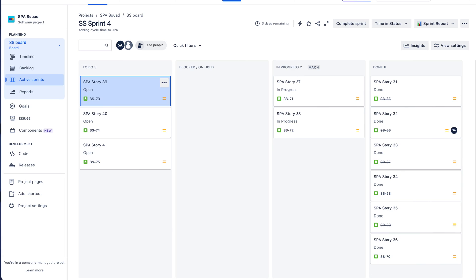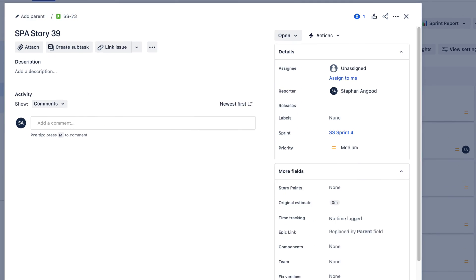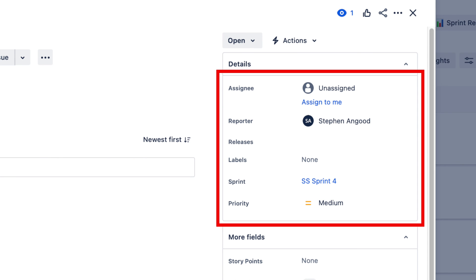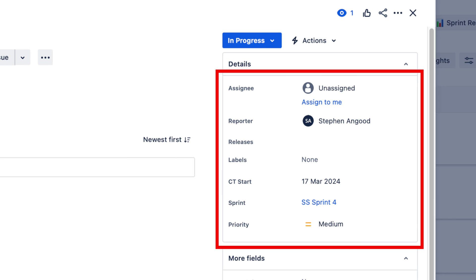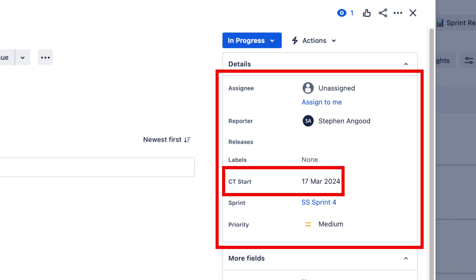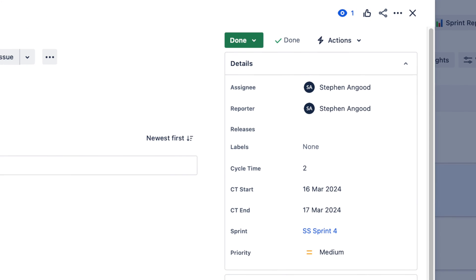That's it. We've created our three custom fields to hold our cycle time start and end date and to store our actual cycle time. We've created the two rules to populate them plus add our cycle time in days to our custom field Cycle Time. Now all we need to do is let some time go by to allow our fields to get populated. So how do you extract this data? Let's have a look at what our custom fields and rules have created by looking at our sprint board. Looking at a story in the To Do column — no cycle time dates are displayed as the story hasn't triggered any automation yet, as it hasn't reached In Progress. Looking at a story in the In Progress column — CT Start has been populated because it's triggered our first automation rule. And looking at a story in the Done column — CT End and Cycle Time in days are both populated. These fields are also non-editable so no one can make any sneaky alterations.